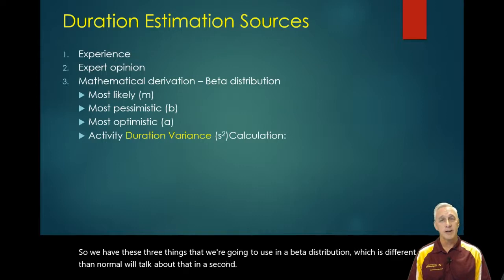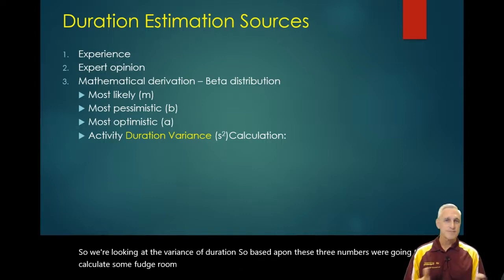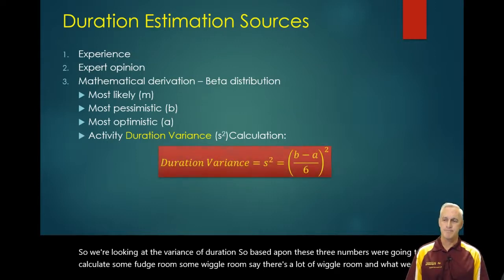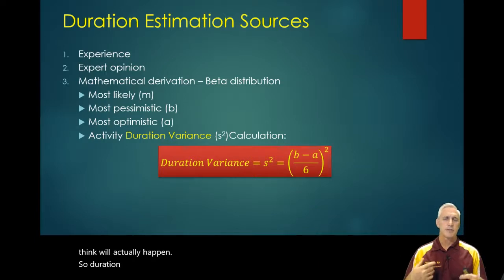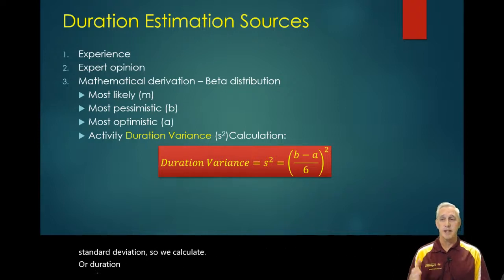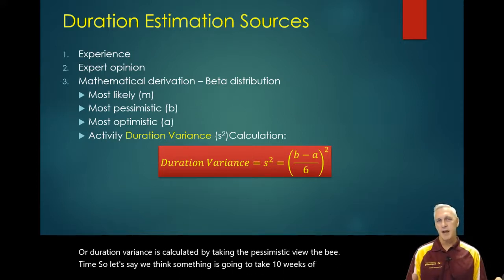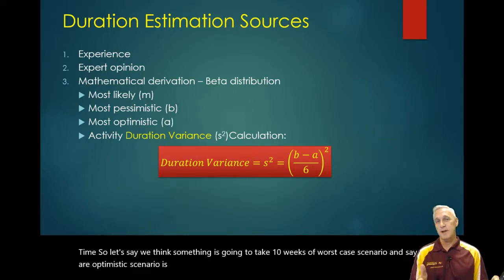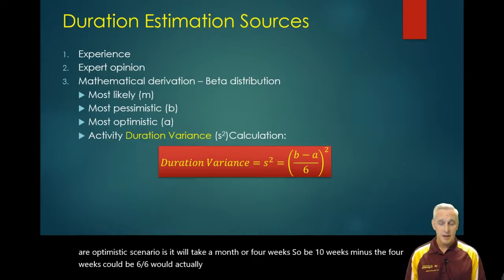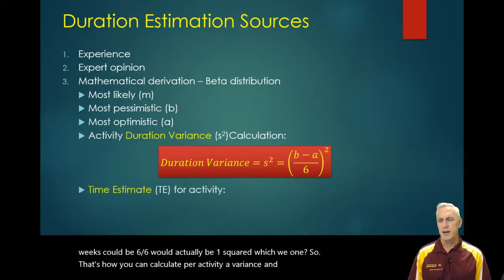We're also looking at the variance of duration. Based upon these three numbers, we're going to calculate some wiggle room. Duration variance is really the square of the standard deviation, and this is for a sample standard deviation. Duration variance is calculated by taking the pessimistic value — say 10 weeks worst case — minus the optimistic, say four weeks. So 10 minus 4 equals 6, divided by 6 equals 1, squared equals 1. That's how you calculate a variance per activity.